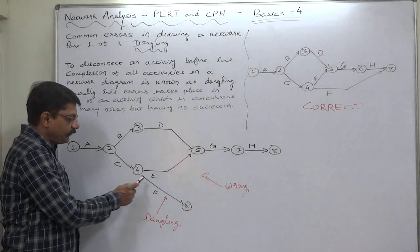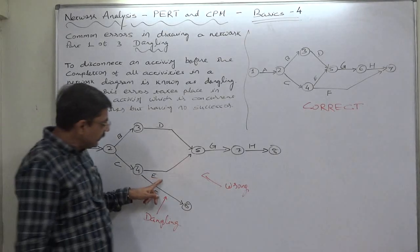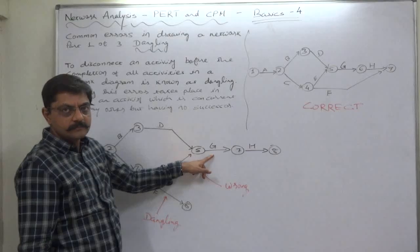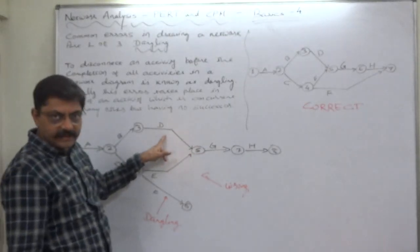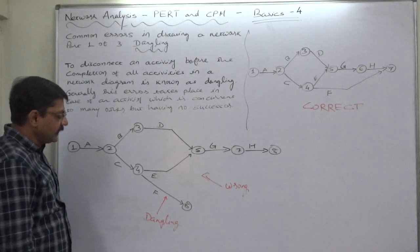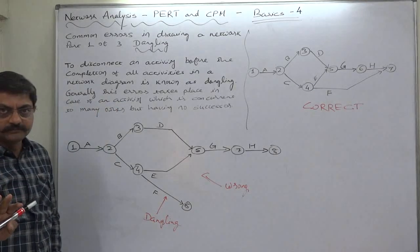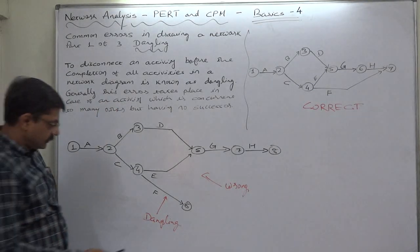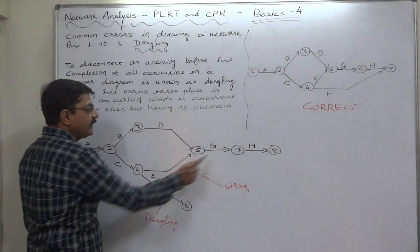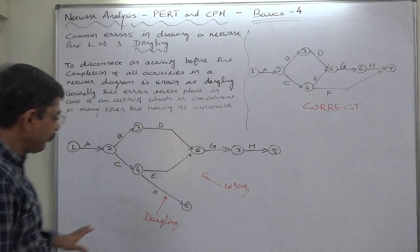...the common predecessor of activity E as well as F. Activity E is predecessor of G together with D. But the interesting thing is, F has no successor. That means we can say that F is an activity concurrent to E, G, and H. But the person who prepared this network diagram has forgotten or ignored that F can be treated as a concurrent activity for E...